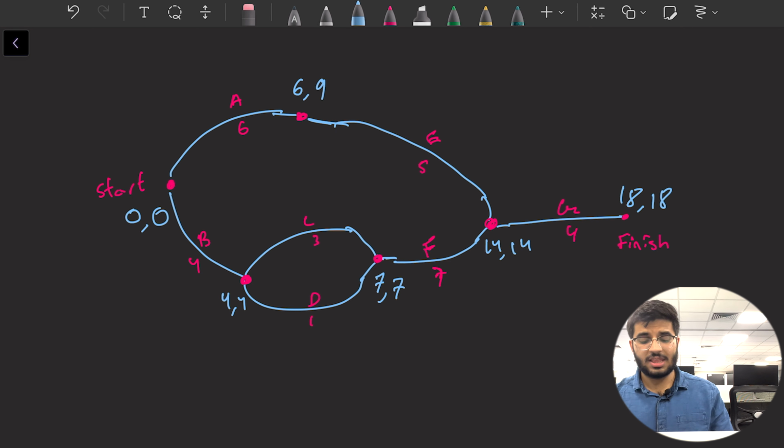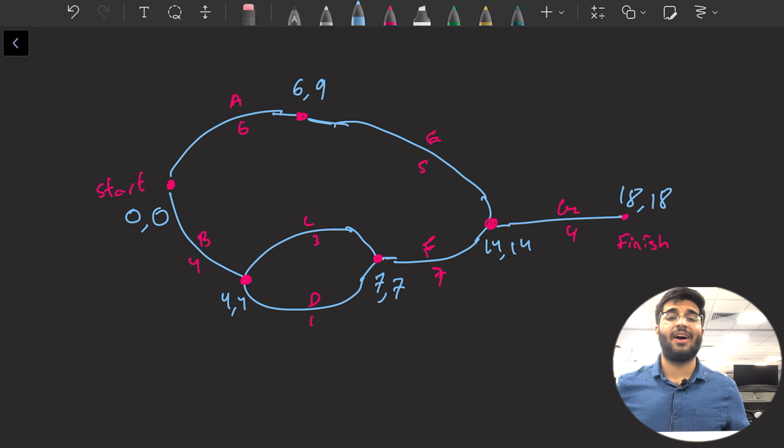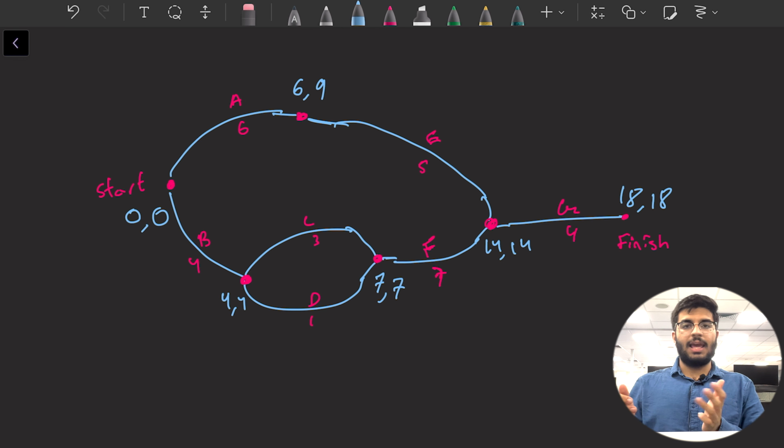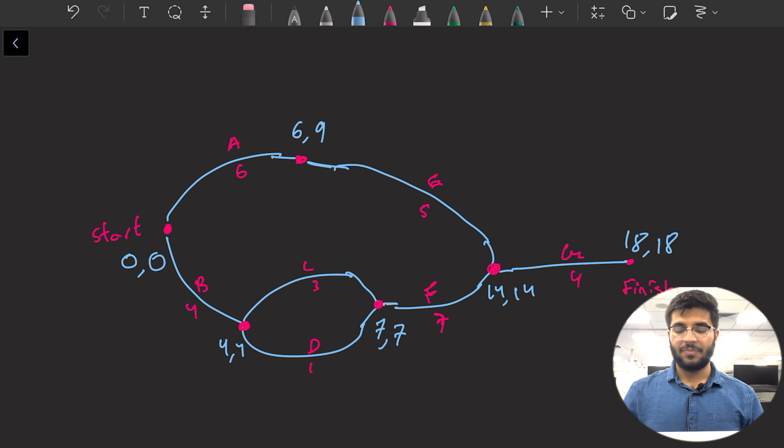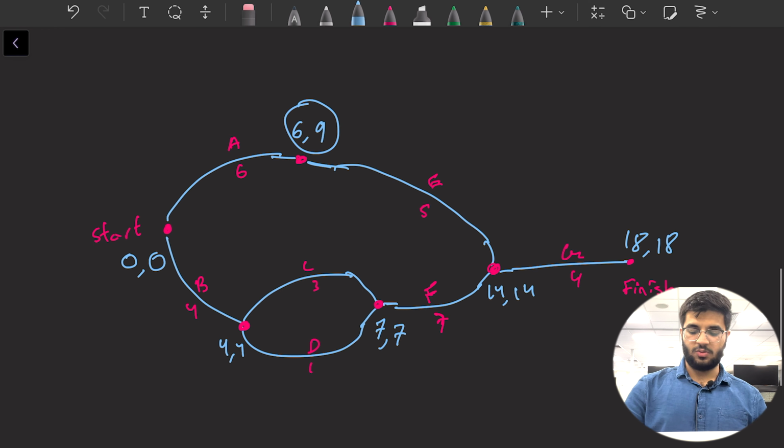Okay, so the reason for doing all of this is we can find what's called the slack time, or the time that you can waste, or the time that you can delay in starting, such that the completion of the entire task is not affected. The minimum time that it takes does not change. So the point is that if I look at this one and I just wait here idly for 3 minutes, nothing's going to change because it does not cause the process to be delayed. I'm still going to end up here as 14 instead, and everything's going to be fine.